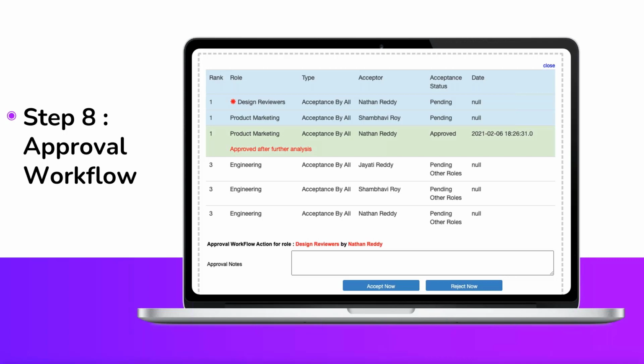You might say, like I explained before, if a customer requirement gets modified, I want the product manager, the customer's representative, and the vendor to approve them in this sequence. Or you might say, if a business requirement gets modified, I want the dev manager to approve it first and then followed by the VP of engineering. So you should be able to set your own approval workflow, and the system should pretty much run on autopilot after that.